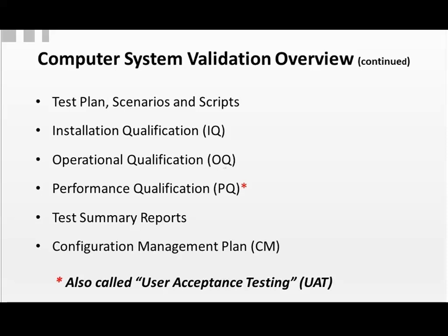And again, your validation plan should lay out all of these deliverables as part of the planning effort. You're going to deliver all of these things. Your validation procedure is going to give you a template that will show you step by step how to do validation, starting with planning and progressing through all of these deliverables. And the validation procedure should include a template for each one of these. Anywhere you need a protocol or a report or some type of log or any kind of recording device, you want to make sure that it's available as a template in your procedure so that you do things consistently.